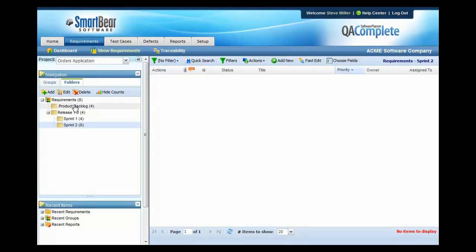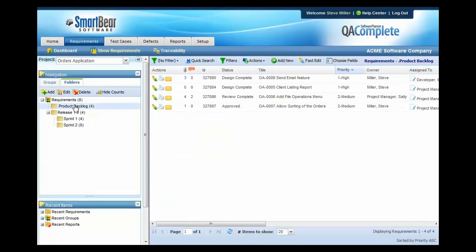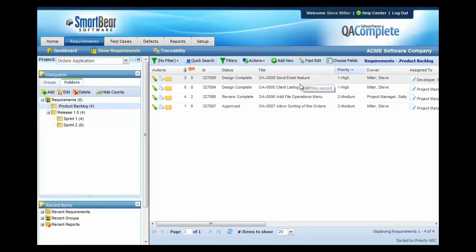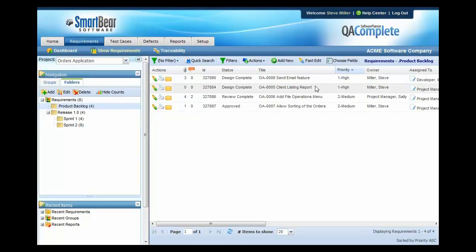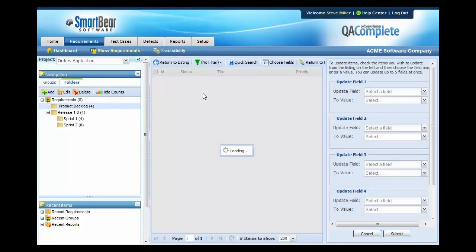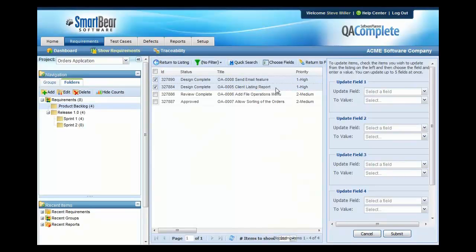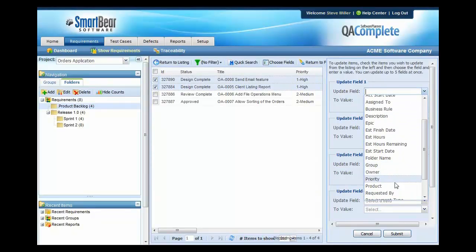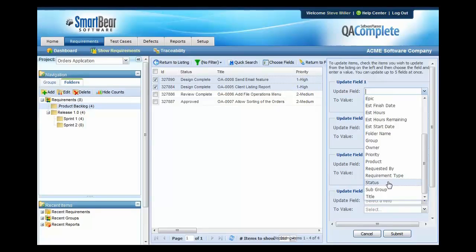So I'm going to go to the product backlog and I'm going to identify the two high priority items and I'm going to change those to an approved state and we're going to move them into Sprint 2. We can very easily do that by simply pressing Fast Edit and then choosing Update Multiple Items. I'm going to select these two high priority items and I'm going to move the status to be approved.